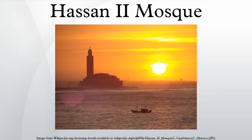However, the building was not completed on schedule, which delayed inauguration. The formal inauguration was subsequently chosen to be the 11th Rabi al-Awwal of the year 1414 of the Hijra, corresponding to August 30, 1993, which also marked the eve of the anniversary of Prophet Muhammad's birth. It was dedicated to the Sovereign of Morocco.